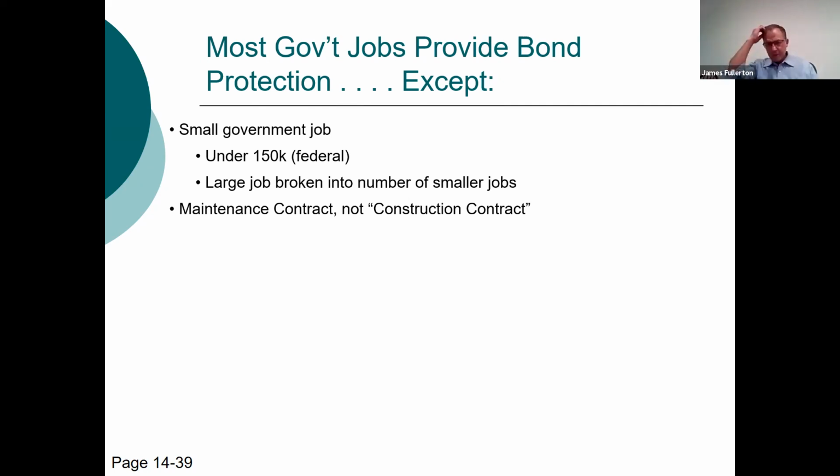And I was working for the supplier, manufacturer of HVAC equipment. And fortunately, we realized that and could explain to the client, no, this is not a construction contract. This is a maintenance contract. This is not bonded. So they had to check the creditworthiness of their customer much more carefully and had to think about requiring alternate security.